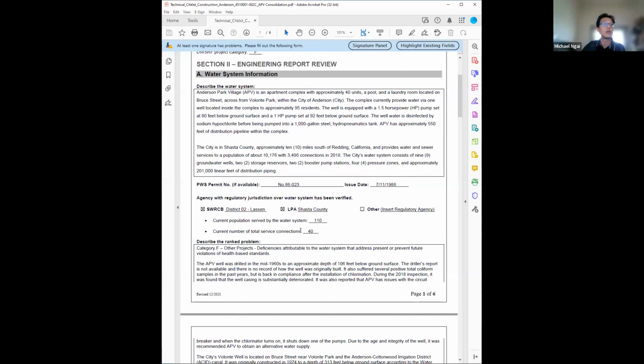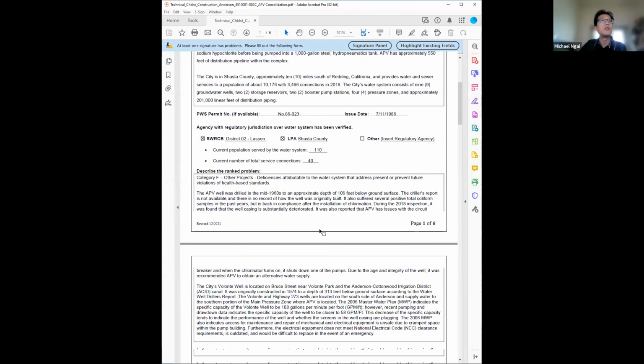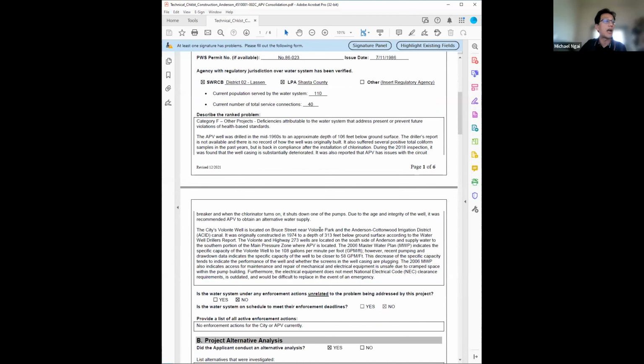Population, surface connection, these numbers are very important now, because we have a per surface connection eligible cost. We don't have a set amount anymore. The eligible amount depends on the surface connection. So all these numbers we would like to be as clear as possible and, again, match as much as possible.